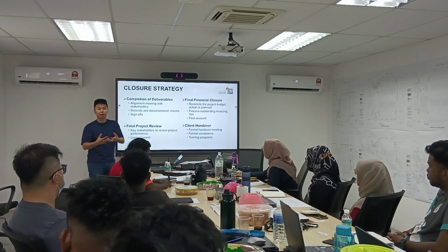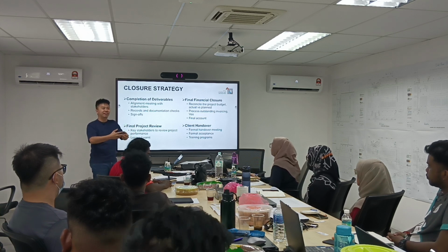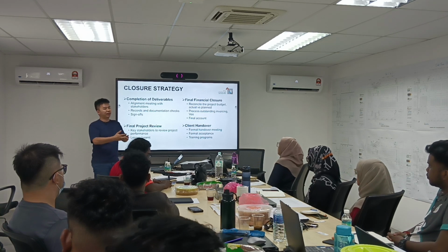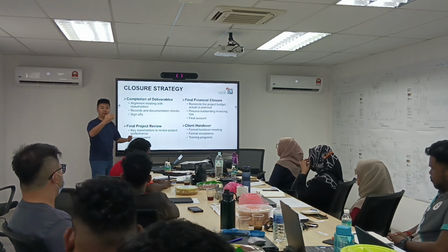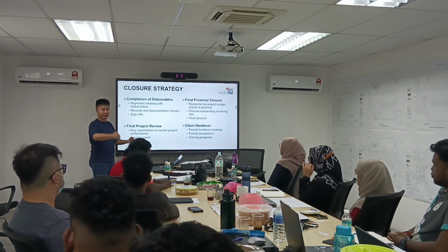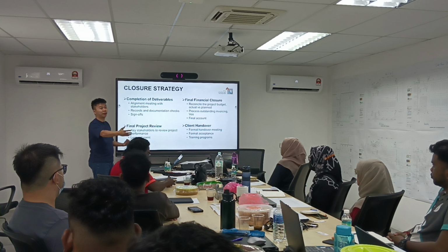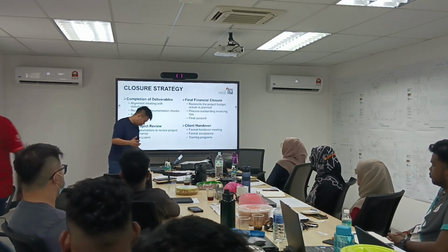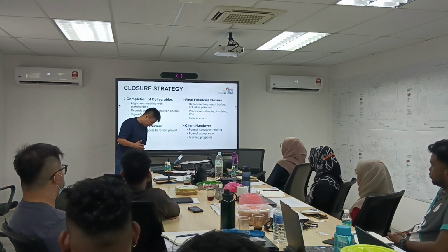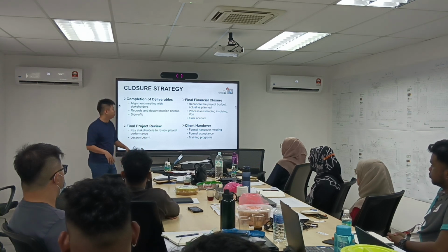All those have passwords, but we don't have those passwords, and I believe even until today we haven't handed over the passwords, right? So those are the problem. That's why they keep on fighting us and keep on repeating, wanting us to do something extra. But if you ask me, are those extra things our scope? I will tell you no, it's not our scope.